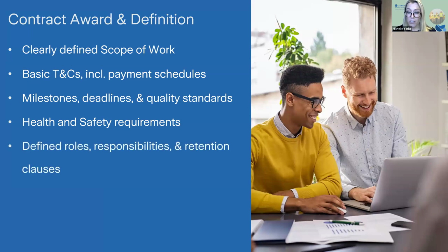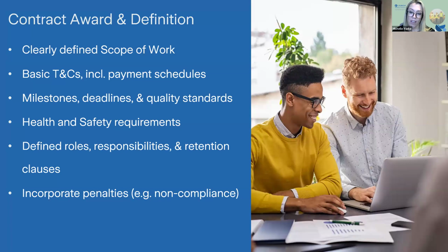Clearly define roles and responsibilities to avoid confusion, and you might want to include a basic retention clause to incentivize satisfactory project completion. Additionally, you might want to think about incorporating some penalties for non-compliance. That's reduced payments, perhaps, where they haven't complied with certain aspects.